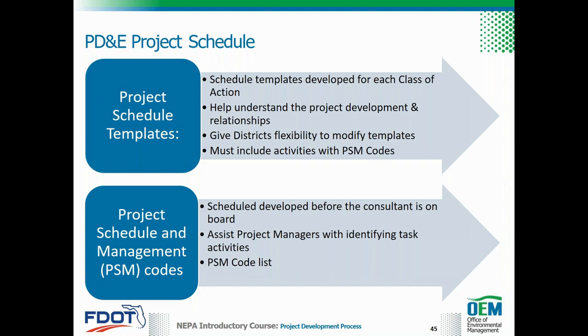Prior to the PD&E advertisement, the PD&E project manager should work with the district program management office to create a schedule that uses PSM codes. The project manager should develop a project schedule using information discussed in the SWOT kickoff meeting and convey the project schedule to the district program management office scheduler. The scheduler should enter identified schedule milestones in the PSM with corresponding codes prior to the advertisement for consultant acquisition. If the consultant is under contract for the project, the project manager should communicate the expectation of the project schedule to ensure the consultant meets the scheduled demands.